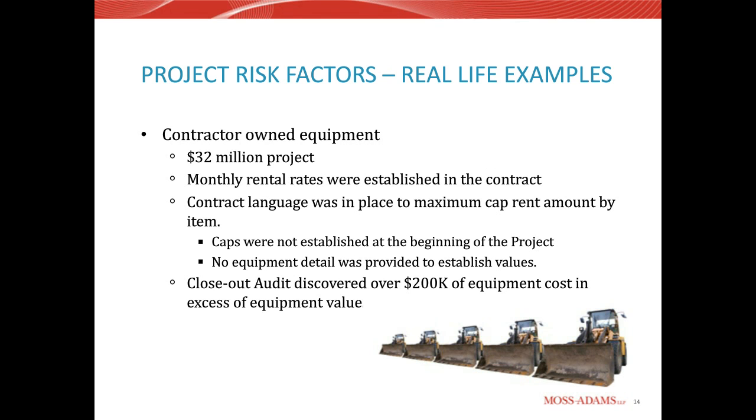Our final real-life example has to do with contractor-owned equipment. This probably is one of the areas where we see the most issues. What happens on a construction project is the general contractor a lot of times has a lot of equipment they own as a company. Some of it might be brand new, most of it is usually used or from other projects, and it comes onto the project, and then the general contractor bills on a monthly basis a rental amount.